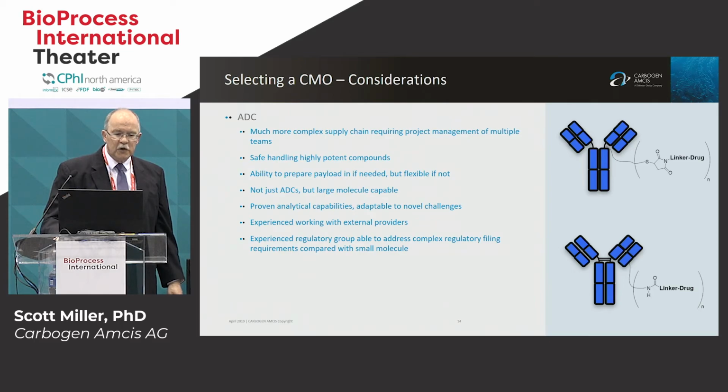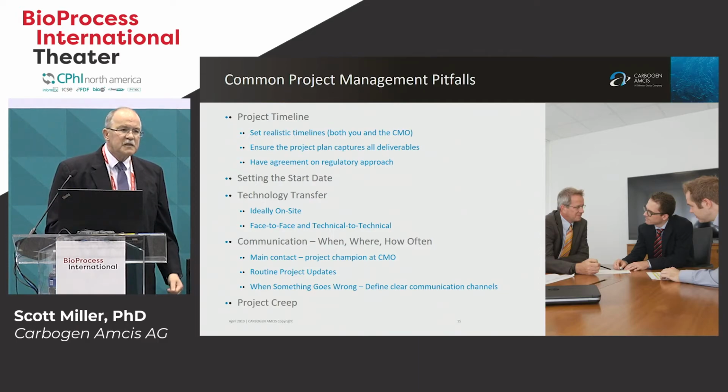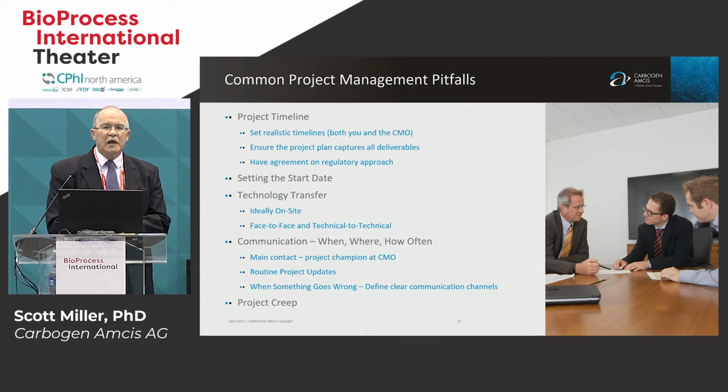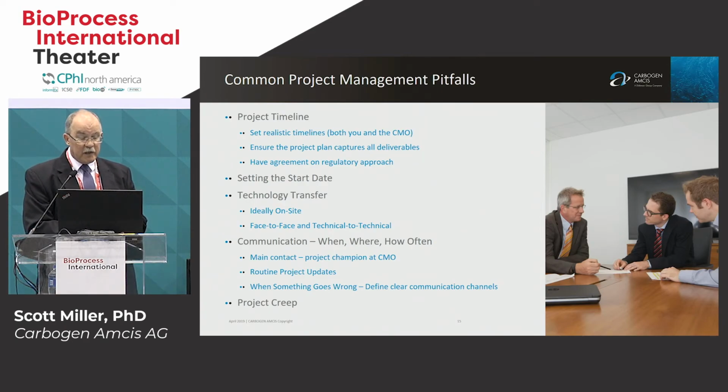And again, you notice a repeat emphasis on regulatory group. So just some things to think about when you're managing a project of this complexity. Re-emphasize, I mentioned previously, project timeline. Be sure to set realistic timelines for yourself and for the CMO. Be sure that you capture all the work. This is important: when you first formulate your request for proposal, do you know what all needs to be done? And can this then be captured in a project timeline?